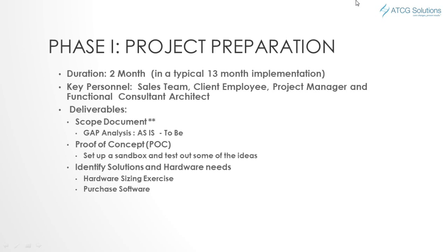A gap analysis, as-is and to-be, will be completed, and the to-be will be the future landscape and architecture. Proof of concept. A sandbox is set up to test out some of the ideas that the functional consultant will push out. Identify solution and hardware need. Again, hardware sizing exercise and purchase software and hardware.